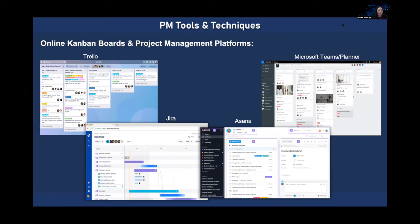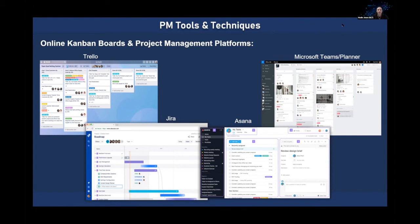These are some examples of the online web versions of the Kanban board, and they're convertible into other things. For example, on the bottom left, JIRA — you can create your Kanban board and then convert it into a Gantt chart, assuming your tasks have start and end dates in the cards. You can add labels, export to CSV, assign tasks to team members, and add checklists. Each one of those little blocks is a card, and you can put extreme amounts of detail into each card, including requirements, deliverables, attachments, and comments. We found these tools to be really useful for tracking tasks as you go along.